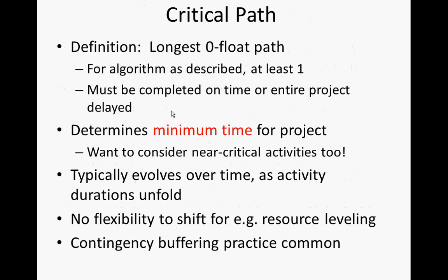Now, it turns out if you're dealing with these more sophisticated types of dependencies like start-to-start, etc., the notion of the critical path has some non-intuitive features. Here it's completely straightforward. It's the longest zero float path from start to finish, and it must be completed on time or the entire project is delayed. It determines the minimum time for the project.